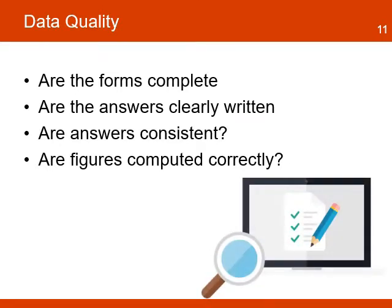Data needs to be checked for quality during and after the collection. Here are some of the errors to check that the project manager and the M&E officer should incorporate in the quality process: Are the forms complete? Are the answers clearly written? Are answers consistent? Are figures computed correctly? Many errors occur when people in charge of collecting the data don't have proper training and enter data incorrectly, resulting in reports that show inconsistency or even contradictory information.